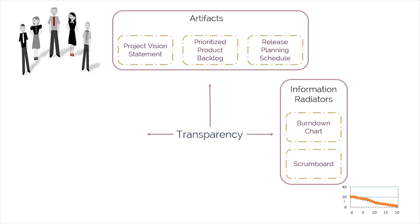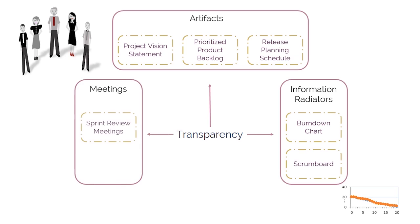Information Radiators, such as the Scrum Board and Burndown Charts, make a team's progress clearly visible to all. Daily stand-up meetings are conducted during the Conduct Daily Stand-Up Process, in which all team members report what they've done the previous day, what they plan to do today, and any problems preventing them from completing their tasks in the current sprint.